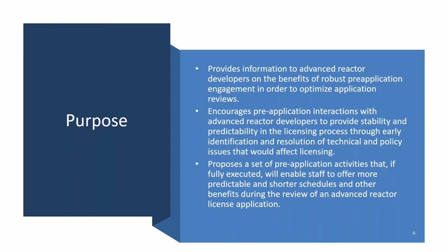I'll expand upon it a little bit more later, but how you go about that is that technical issues are resolved through topical reports in which you obtain NRC's review and approval. And regarding policy issues, you are essentially engaging with the NRC to identify those matters that rise to the level of a policy matter, so that one, for awareness, and two, so that the NRC can engage on those and try to resolve them.